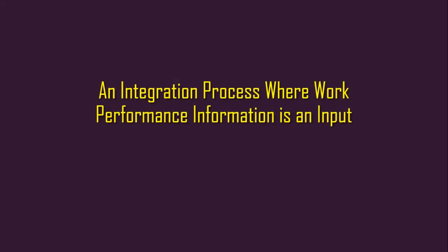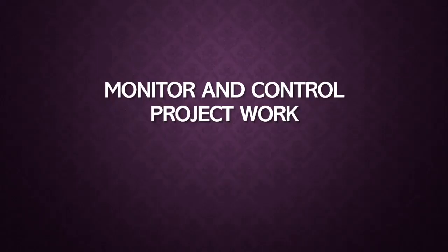So let's jump straight into the very first one for today, an integration process where work performance information is an input. 5, 4, 3, 2, and 1. The answer to this is monitor and control project work. This is the only process where work performance information is an input.